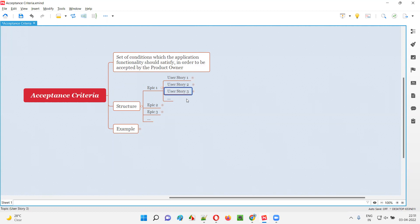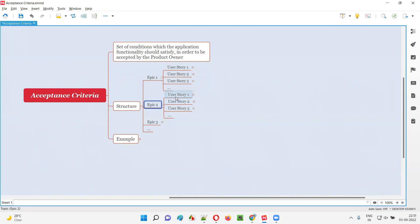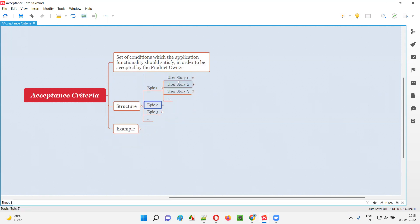In agile projects, you will get the requirements in the form of stories, which are smaller chunks of requirements broken down from higher level requirements known as epics. Each and every epic will be broken down into smaller chunks of requirements, which are nothing but user stories. An epic may have one user story or more than one user story. Stories are the smaller chunks of requirements derived from higher level requirements known as epics.